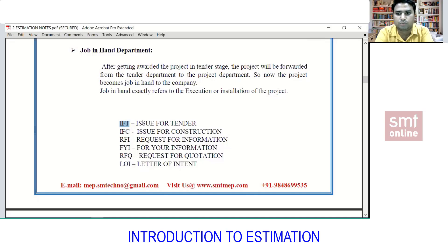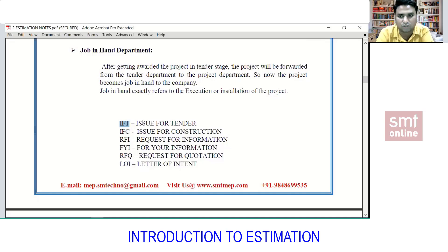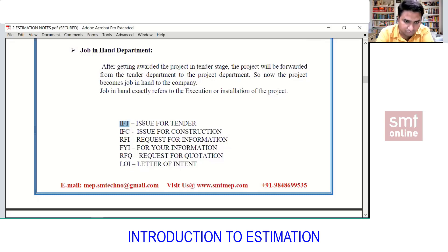RFI stands for Request for Information. If there is a lack of information — for example, you don't find details about a pump or something is missing that is holding you back from proceeding with estimation — you raise an RFI. That means you are requesting information which is not available and which is causing a hurdle to proceeding with the work.